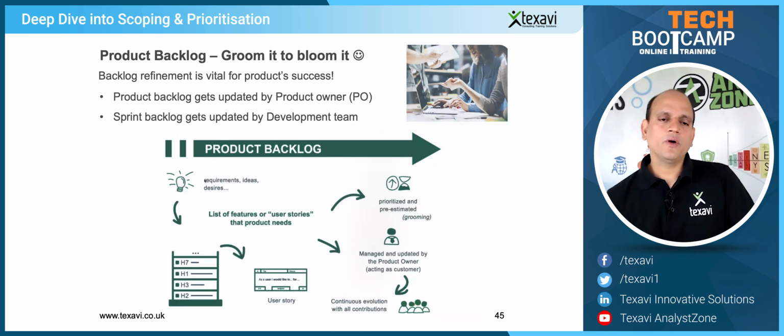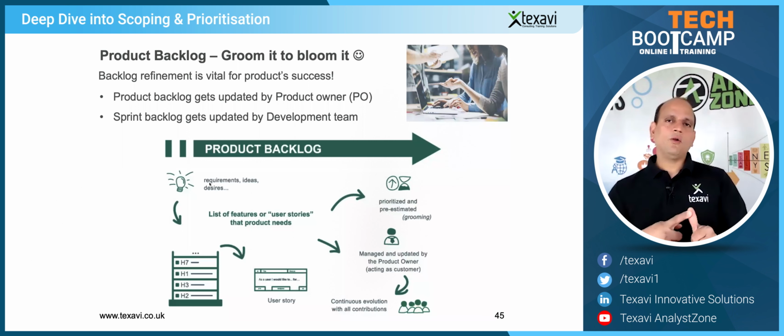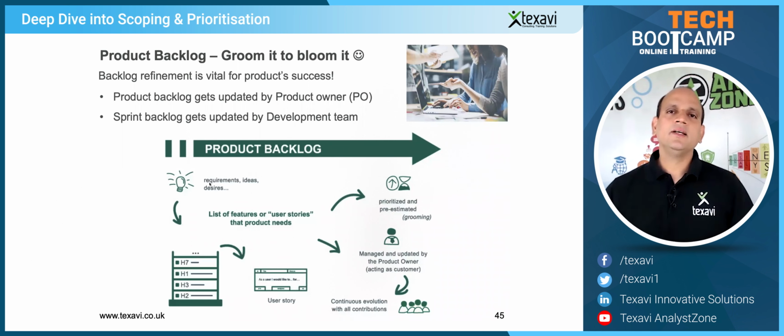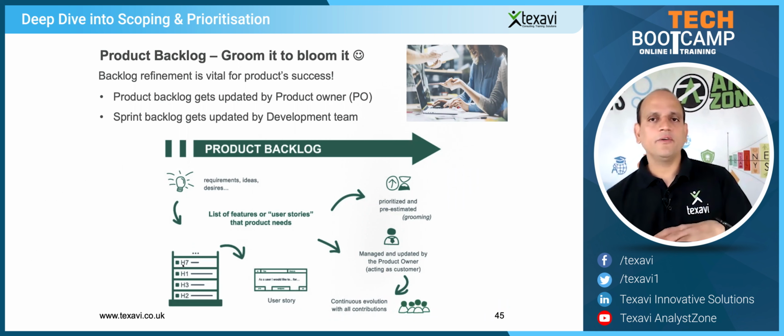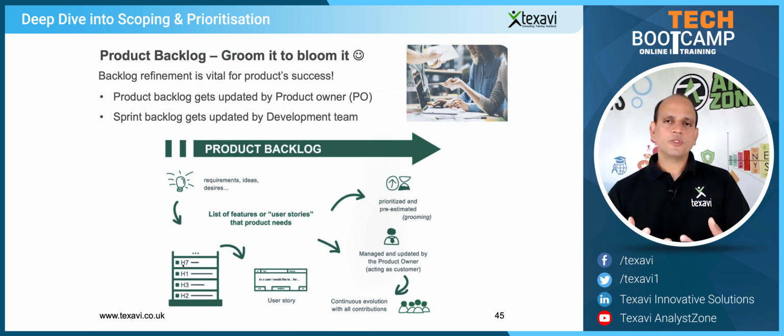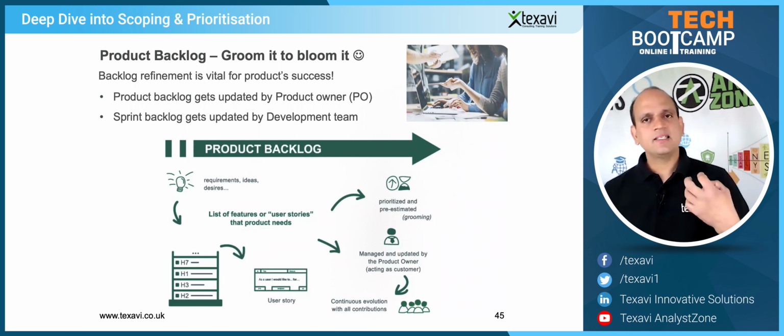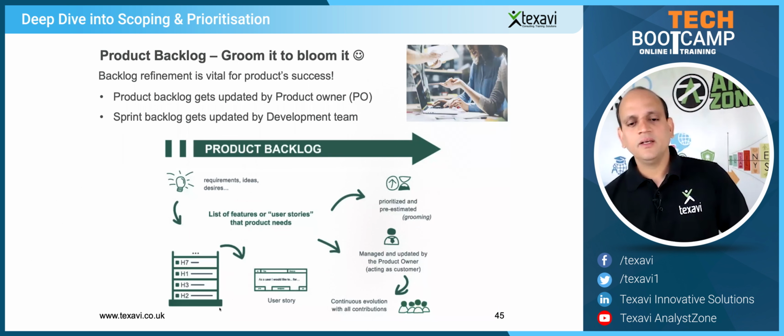So here, that's what we were talking about. The backlog can have requirements, ideas, defects, any kind of wishes, wants. It can have tasks. All of those are part of the backlog. They check everything in there. And then they prioritize: I need to do this, I need to do this. That gets put in order of prioritization. You can apply the MoSCoW principle there; we'll talk about MoSCoW next. So that gets assigned a priority in terms of importance and urgency, and then that gets moved into the sprint.